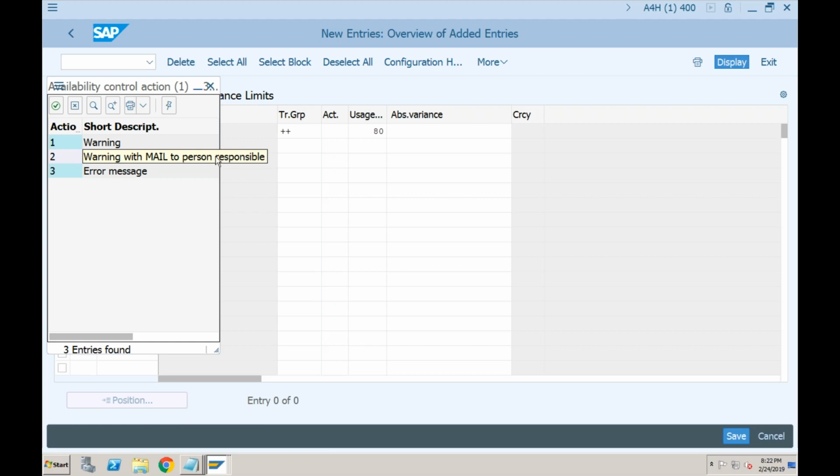That is called as supplement. Supplement means once you have the budget available, after that budget, if you want to add more amount into your allocated budget, in that case, you can call for the supplement. So that is the reason this is very important, that you want the responsible person to know that, okay, I'm getting out of budget.